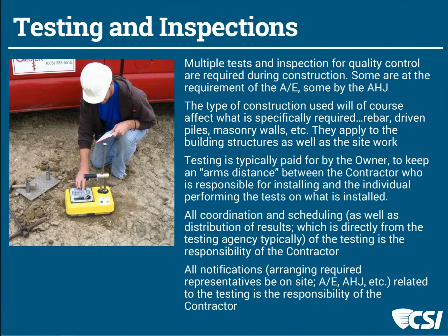on the site. Typically, the owner pays for these because that allows the testing to be held sort of at arm's distance from the contractor, and it gives us a comfort level that if something is found to not be compliant, the testing company will point it out.